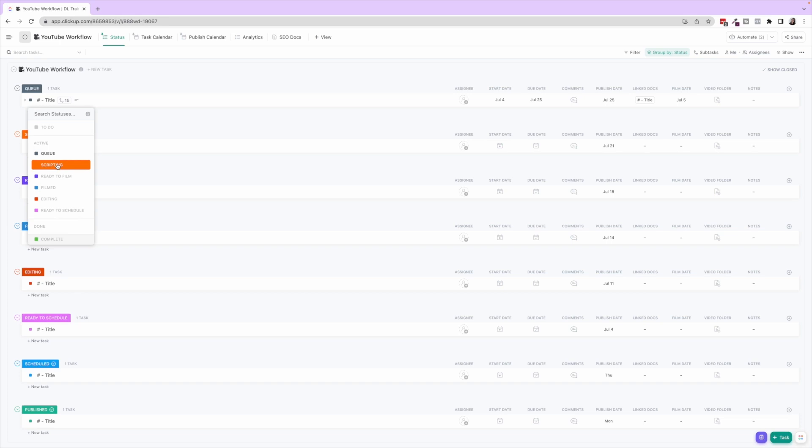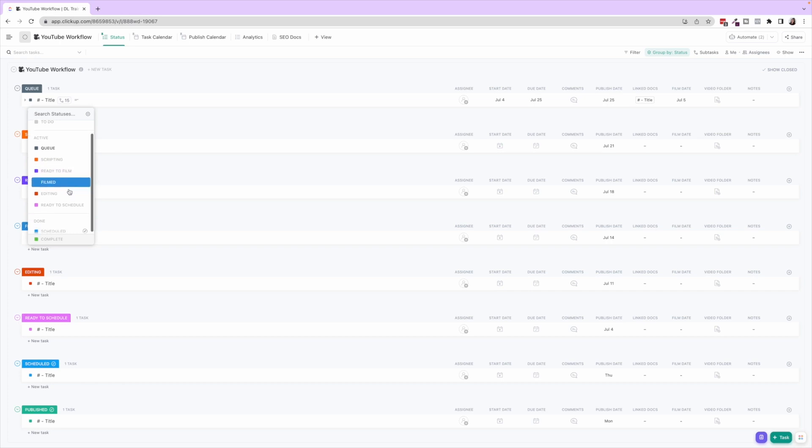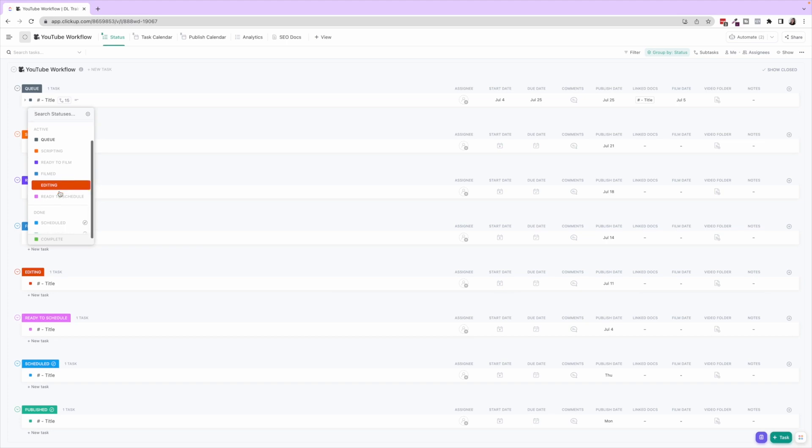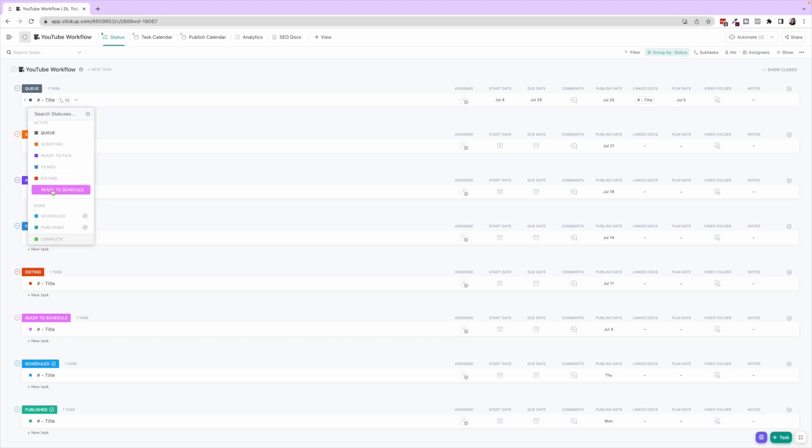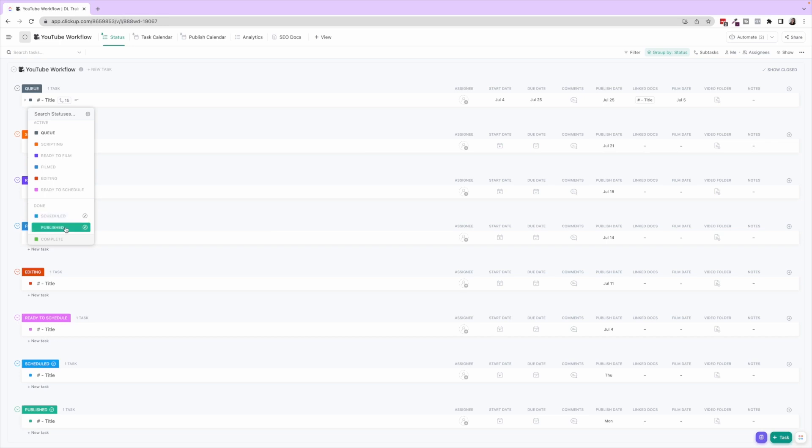After you create the script and the topic for the video, it then goes into Ready to Film where you're waiting for you to film. After you film it, you can put it in Filmed/Editing. We put it in here when it actually gets sent to the editor. Ready to Schedule is when the whole video has been edited, it's good to go, the SEO is done, and it's ready to schedule. Scheduled is obviously it's been scheduled in YouTube, and Published is when the video has been published.